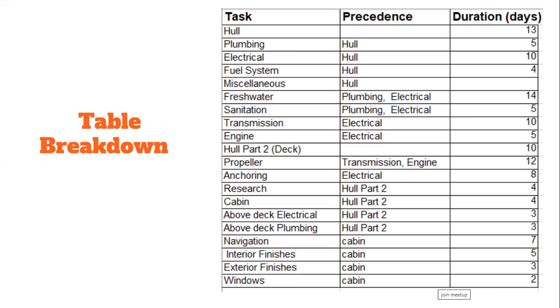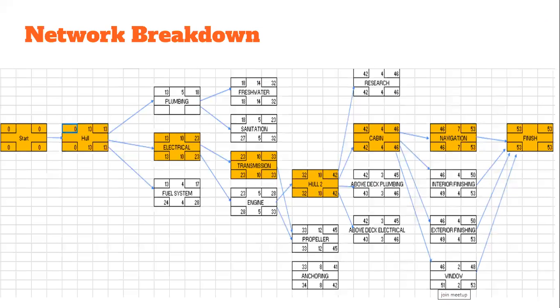Once the consolidated activities were defined, the precedence was established from the schedule defined in the Gantt chart. With a precedence table complete, the project network mapping began by creating nodes from each activity with connecting arrows in place for each precedence.